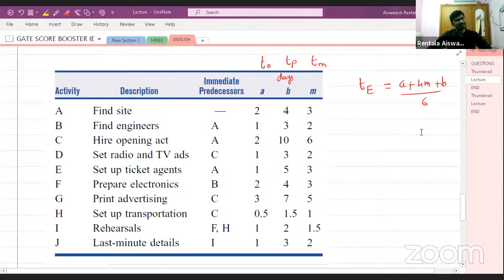So whenever they ask questions, they will try to give these kinds of things so that they can reduce your calculation efforts directly. Okay, very good. Do you remember the ABM values will be following a beta type distribution? Now your beta distribution may be symmetric, or it may be left skew or right skew, leaning towards left or towards right, depending on the values of ABM.